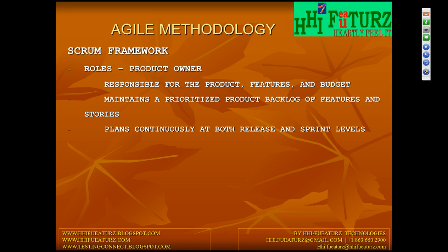Another important thing in your Scrum methodology: for this sprint, as I said, you planned 5 items for sprint one, but in the middle some blockers come up, okay. At that time you are unable to deliver these five user stories, let us assume. So you develop only three. That means the remaining two, you have to carry forward to sprint two. There is no other option. Not only for this project but for 95% of projects, 95% of sprints, it will definitely happen, there is no doubt, okay.